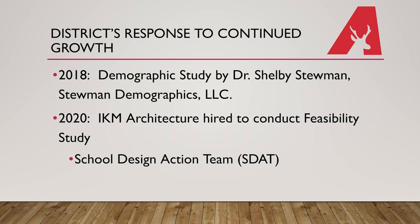Recognizing that our growth was continuing and having moved 6th grade to the elementary building, the planning process continued. The first step taken was the hiring of Dr. Shelby Steumann to conduct another demographic study for the district. His study was completed toward the end of 2018 and presented to the school board in February of 2019. His study predicted our enrollment to be about 1,900 students in 2021, which we are very close to today. By 2028, Dr. Steumann predicted that the district's K-12 enrollment would climb to about 2,100 to 2,200 students. To begin investigating how the district would address this growth, IKM Architecture was hired in 2020 to conduct a feasibility study and present the district with a facility master plan. The study was conducted using a School Design Action Team, also referred to as the SDAT.